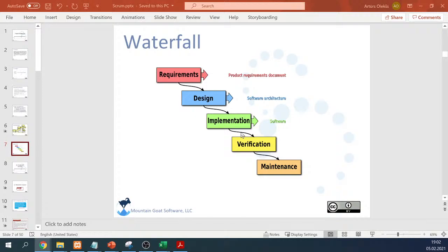It's a very usual thing that we have the requirements, then we start implementing, and even when we finish the implementation and the verification phase comes, the customer realizes that some things were missed in the requirements, and that's why all these things must be repeated.